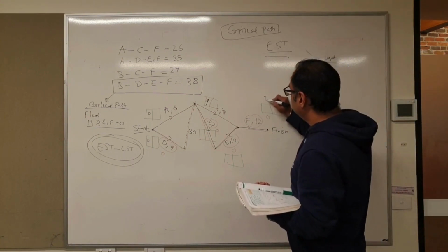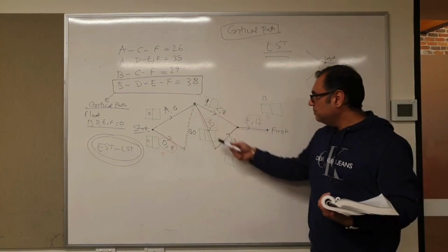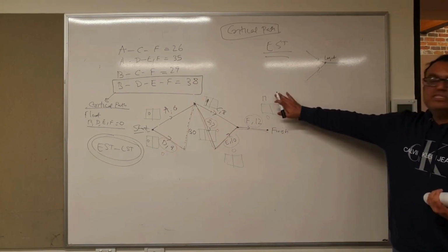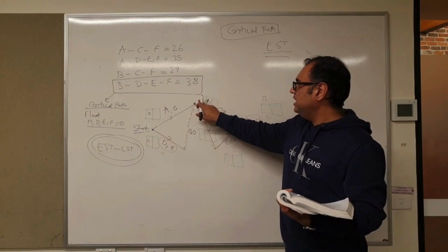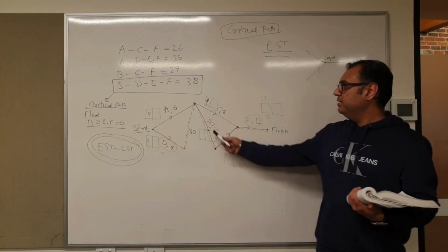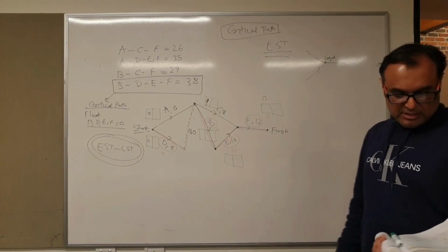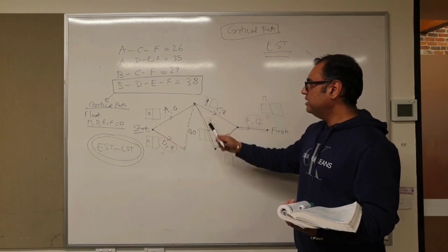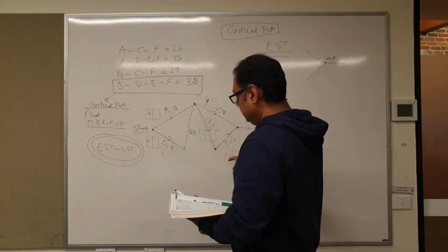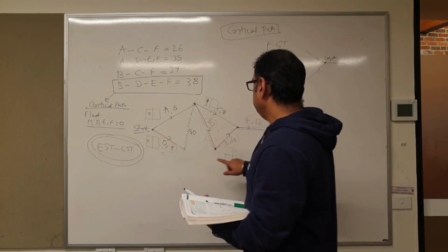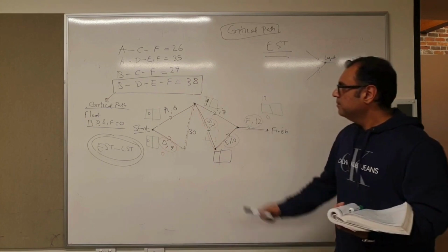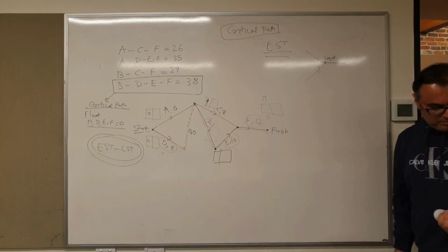So let's hold 17 here and see what's going to go into the box, because there's another path to F which is via D and E. Let's go from C to E via D. From 9, you spend another 7. 9 plus 7 is how much? 16.